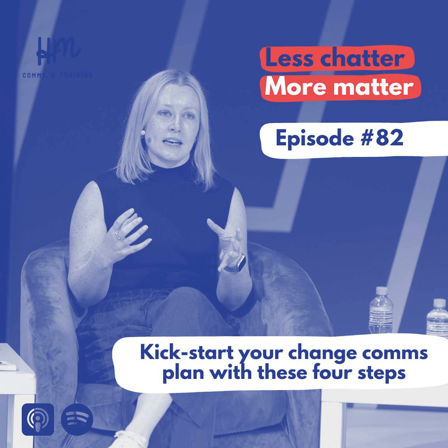So apart from asking how this change will support the organization in achieving its strategic goals, other questions you can ask as part of this briefing process also include, what's the problem you're trying to solve or the opportunity you're trying to take advantage of? Why is that important to the organization right now? What would a great outcome look like for this project? What do you want people to know, feel, and do when we talk about this project? What do people already know? What are the top 3 key messages you want people to take away from this project?